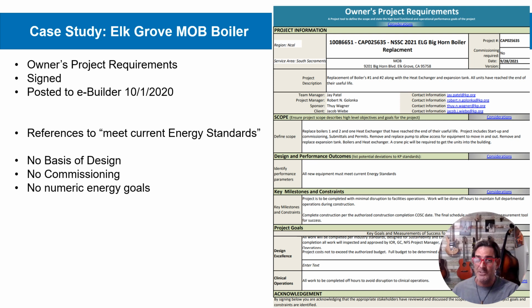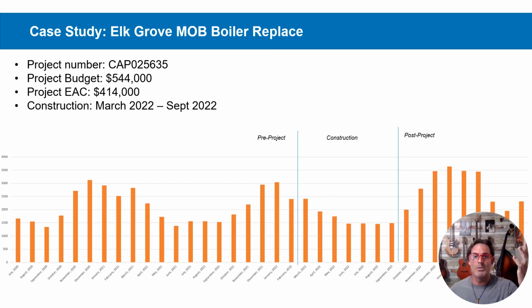This project also didn't do a commissioning plan. They didn't do a commissioning report. There's no commissioning on the project. And so obviously no numeric energy goals. So this is really just kind of a replacing kind project.